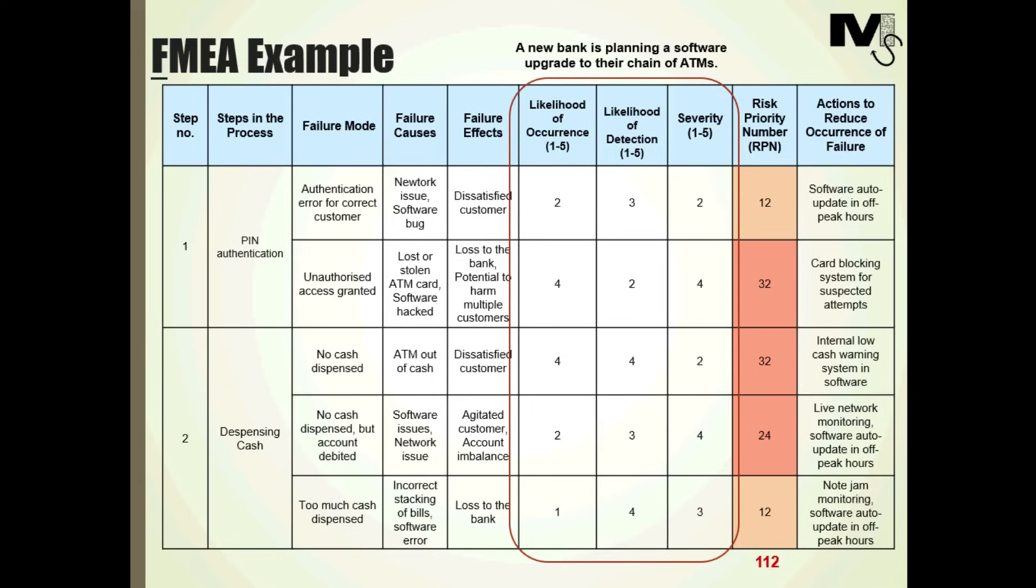Interestingly, if you check severity, the team has provided higher ratings to losses to the bank in comparison to customer dissatisfaction. To avoid this in the real world, one should ensure that the team selected is well balanced.